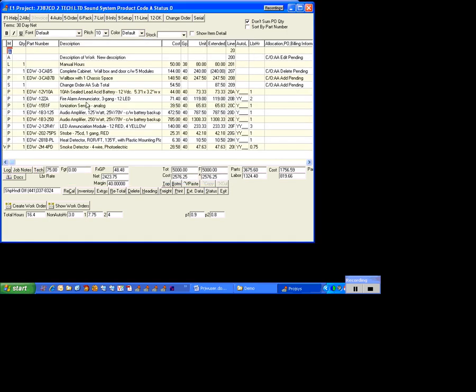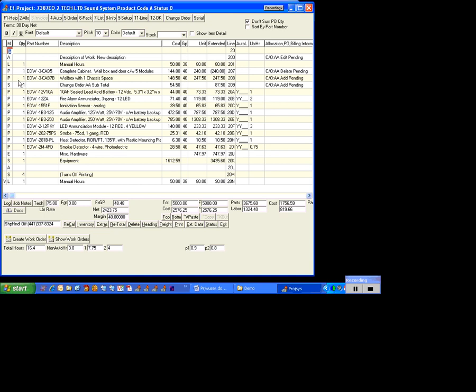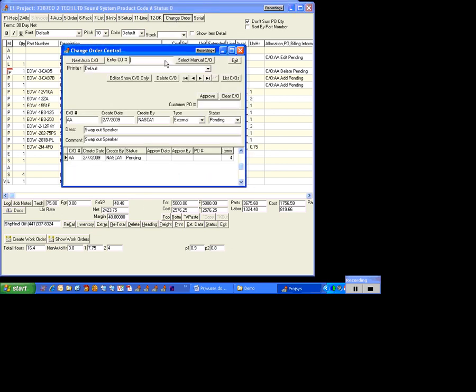Now, we can add other change orders to the project. That's fine. We can create change order sections. All those things are possible. Now, at some point, the customer is either going to accept the change order or not accept the change order. So if the customer is going to accept the change order, we would come over here to change order, and then select which change order we're going to approve, and we'll say this one, and we put in some change order number, just an ID number, or the customer's purchase order number, whatever number we want to use, so we can keep track of that.